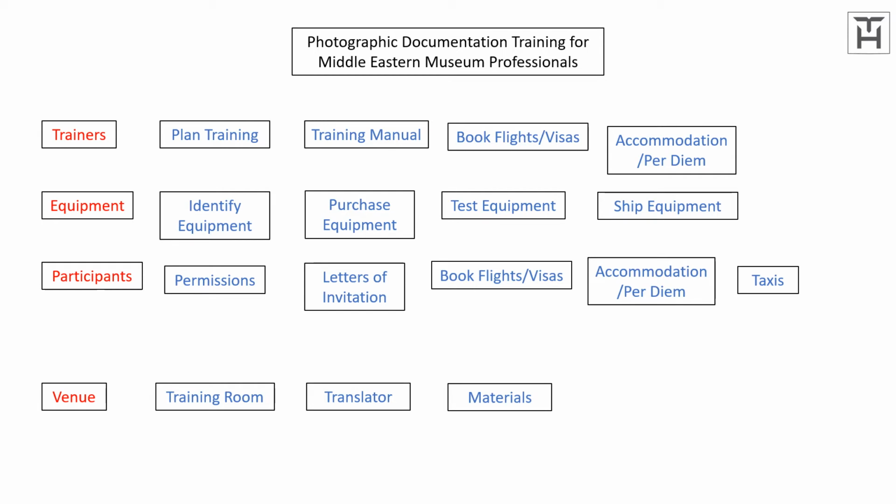I would probably write them on post-it notes, stick them on the wall or on a large sheet of paper, and try and work out with my colleagues what the natural progression of these tasks is, which are the dependent tasks, which are independent tasks, and then try and create a critical path.